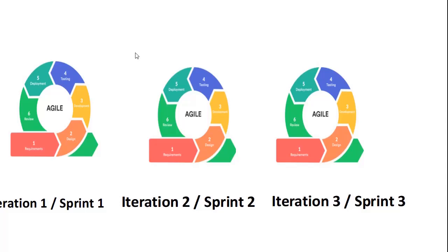If the client needs any enhancement or has any feedback, he will say it right away in the sprint demo. Then the users, the scrum master or the developers will make a note of those enhancements and changes. They will list out all the changes and apply those changes in the next sprint, that is the next 2 weeks sprint. In sprint 2 they will have new features as well. Along with that, the enhancement of old features is also worked on in this 2 weeks sprint. Again, after this second sprint they will deliver a demo to the client. So now in this case, what will the client check?